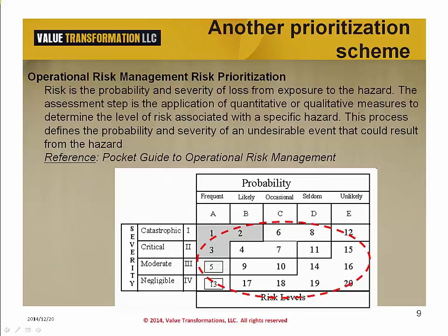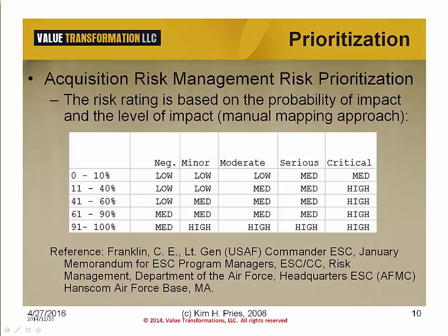The next in the severity list is number 4 at likely and critical. Then we move down toward risk 5, which is moderate in impact but happens frequently, and so on. The risk that caused the least amount of harm is number 20, negligible impact and not very likely to happen.